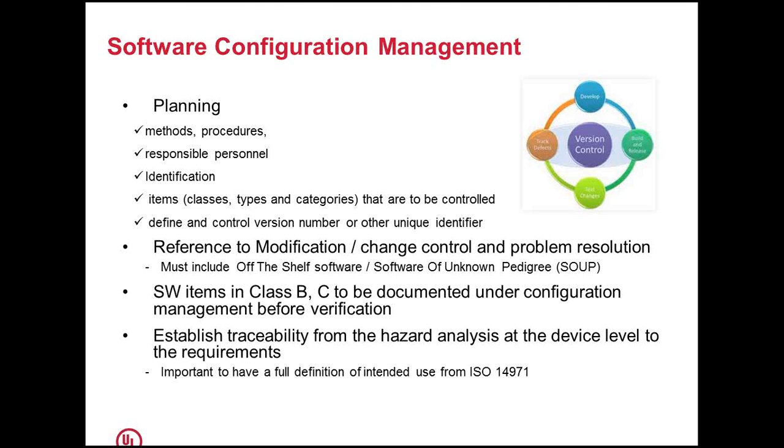Configuration management. First you need to have a plan in place on how you control the configuration. You need to have the procedures, identify who is the responsible person for this activity, and how you will identify what things you are going to control, and how the control number, version and all the unique identification will be done. And with respect to modification, change control and problem resolution, you need to also include the off-the-shelf software or any other software which you are not sure has gone through these processes.